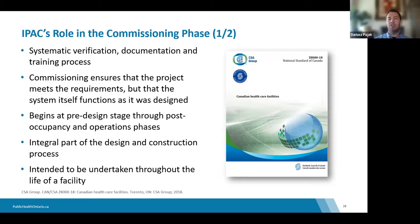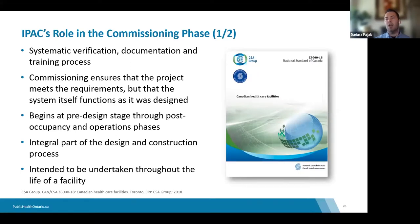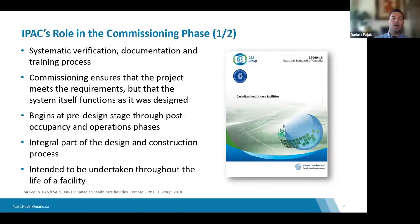Commissioning ensures not only that each component meets requirements but that the system itself functions as designed. As system performance can change over time, it's vital that commissioning is ongoing and adjustments are made. An example is HVAC systems — frequently mentioned during the pandemic, improving ventilation and ensuring systems are optimized. Even if the system is existing and unchanged, ongoing commissioning ensures it is performing as intended.